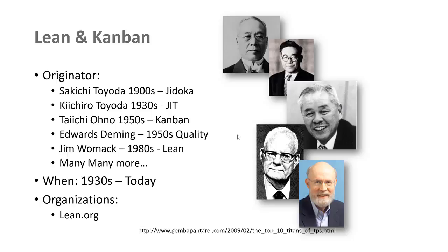We don't want to elaborate the requirements in detail until we actually need them. So I write down a couple of notes on what we call a story card, and we keep those notes so that we remember, but we do the elaboration just in time, right before we implement. Then we have the most information about the real context.